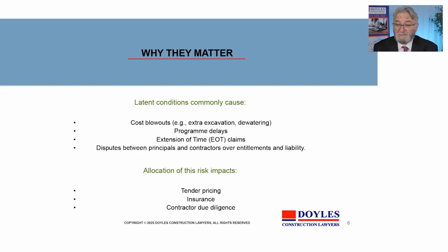On the other hand, if latent conditions are encountered, there's no notice and there's much panic. So latent conditions commonly cause cost blowouts, extra excavation, dewatering.